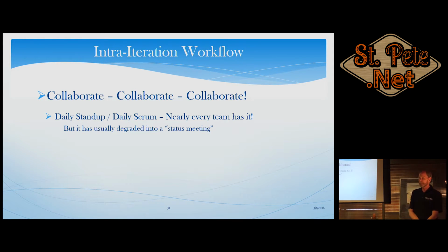Shortest scrum meeting, shortest daily meeting in the world. Everybody walks in and you ask one question: are we confident that we will meet our deliverables for the sprint? Roman vote. Yes? Yeah, maybe. No. Ideally, you get all thumbs up and say, okay, great, we're on track, and you leave. Meeting's over. If somebody goes, I don't know, focus on what we have to do to get that back up to here. If somebody goes like this, stop and ask, how the heck did we get to here without first getting a here yesterday? Because you've got a big problem. Shortest in the world.